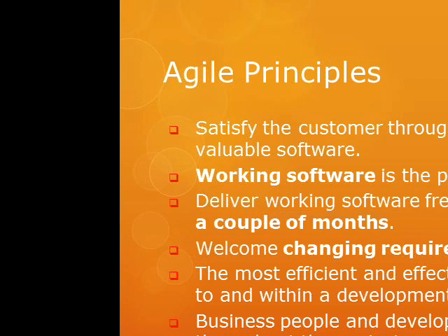So whenever you plan for the sprint, you create the user stories, which are also called requirements in the base doc. Whenever any business person comes and says, okay, you have to make this feature for us, that feature is a user story for us. And we can break one feature into multiple user stories, which we can cover in different sprints.